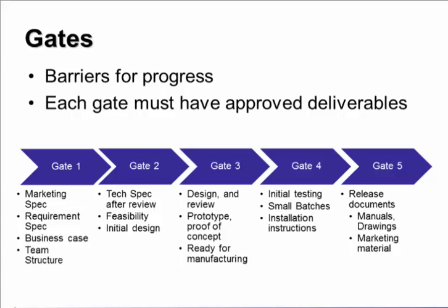If you're building a new product or a new task, it is creating that process. Then you go through a manufacturing phase, an implementation phase, possibly a phase that allows the particular part to be tested, in other words, running prototypes. And then finally, a commissioning phase, a handover to the client, with all the documentation that is required for it.